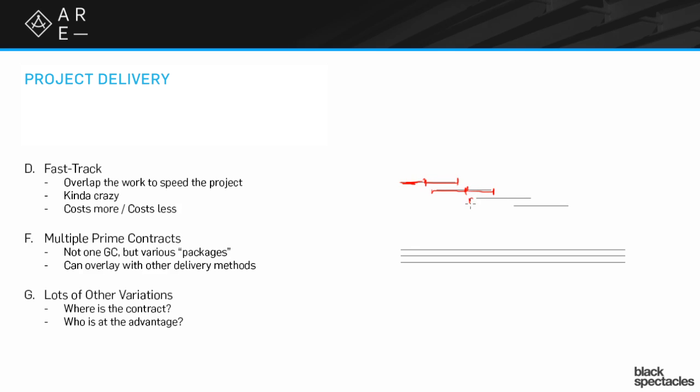And then the architect is designing the shell system, those curtain walls, say, and then the contractor is going to be, so everything is overlapped, and as soon as you finish the design work of one of those packages, it then gets handed off to the contractor. And once that gets handed off, they start building.